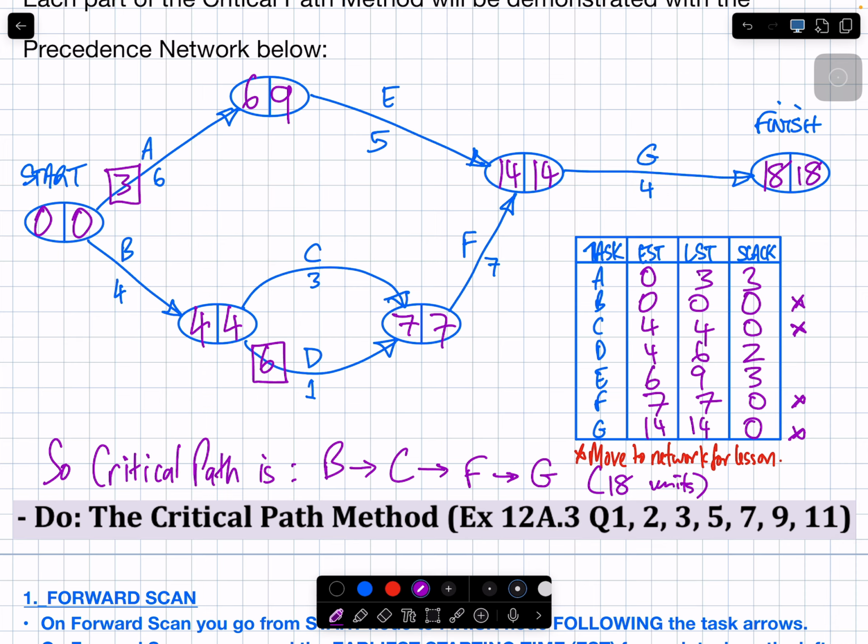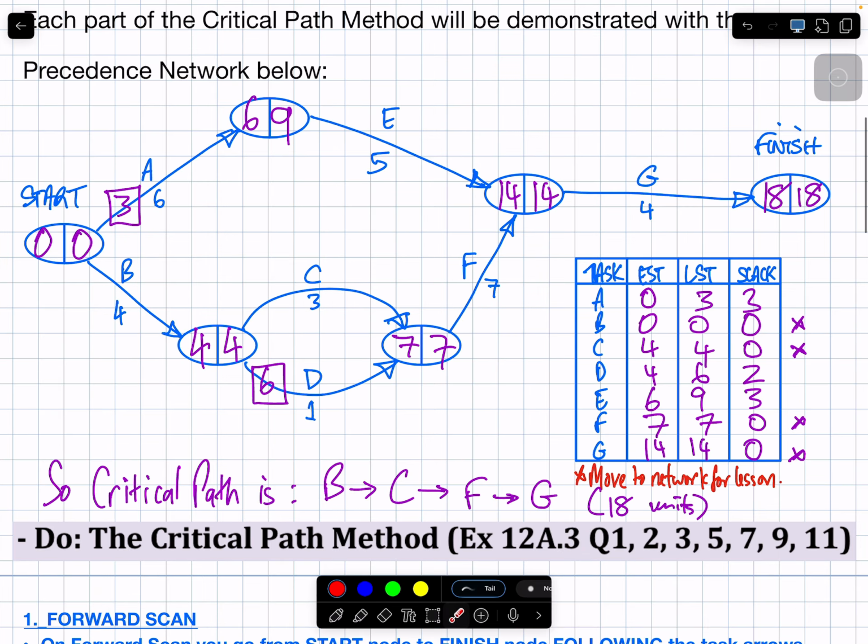Why is there slack? What does the slack mean? Well, see how in total going down through here, that's 7, 8, 9, 10, 11, 12, 13. That whole path there is 14 minutes. What's the path up here? 11. What's the difference between 14 and 11? Does that explain why I can leave A alone for 3? Because if I left the 5 alone for 3, it would delay it too much.